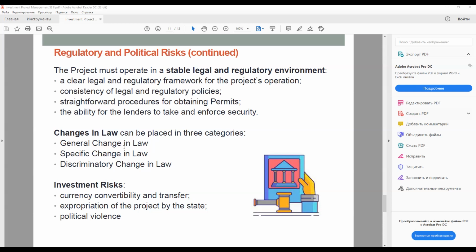If the project agreement does not contain adequate change in law provisions, the project risk in this respect can be substantial. An example of change in law occurred in Europe, in Spain, where the government announced in 2012 that the tariffs payable for power generated by solar or wind energy projects were not sustainable, and that it intended to cap the profits made by such projects. In such cases, foreign investors and lenders may get some protection from bilateral investment protection treaties between their home country and the host government, Spain in this case.